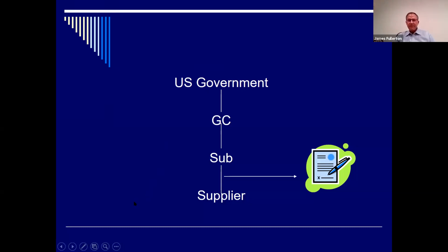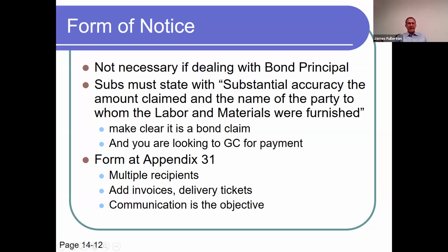That's very frightening if you're a general contractor, and I spend a fair amount of time coaching my general contractor clients that they need to police these projects more carefully. But on the reverse side, as a claimant, this is a big part of the reason why you're just not going to have as much payment problem on a bonded project, because the GC is going to be policing payments. They're going to be a lot more careful to make sure all suppliers on the project are being paid.